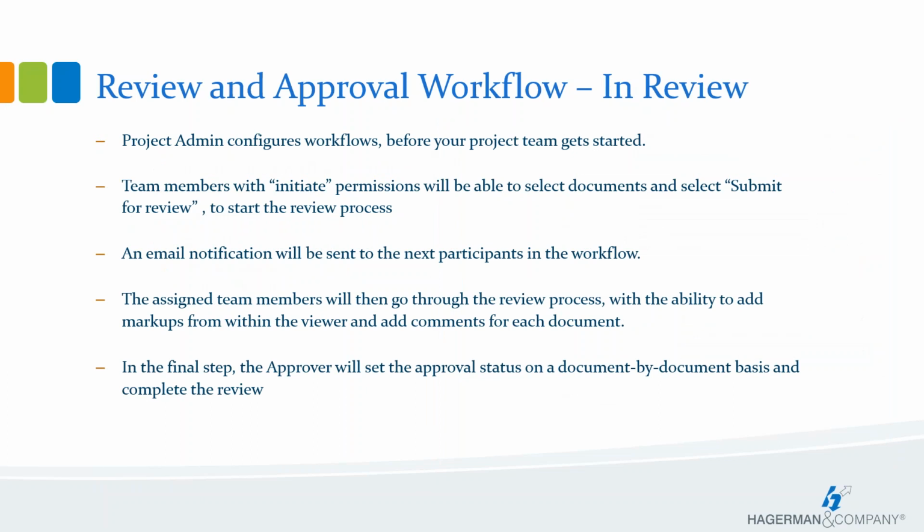Okay. So just in review of the workflow here for using this review and approval process, before a project can get started using the review and approval workflow, a project admin will need to set up the review workflow templates. So if someone tries to click on that review button and no templates have been set up, they're not going to be able to go any further.